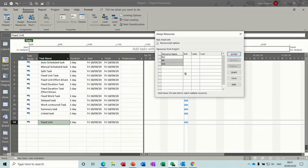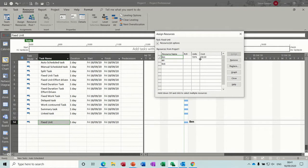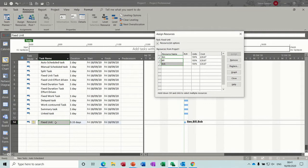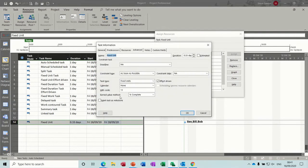If I remove all three, and just add one person, assign, and then add the other two, it will now drive it down. And that's what that effort driven tick means, what it does.